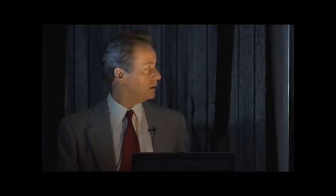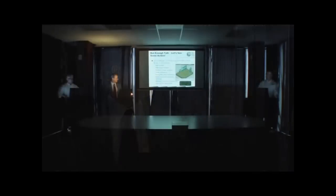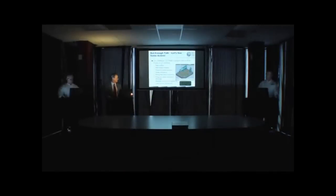We're going to complete pipe routing that may not be yet done. We're going to do the engineering analyses on these. For example, the stress analysis on the critical lines and the pressure vessel analysis on the critical vessels. Once we have done that, we're going to produce the deliverables, the stress isometrics, the piping fabrication drawings, and the pressure vessel fabrication drawings as well.